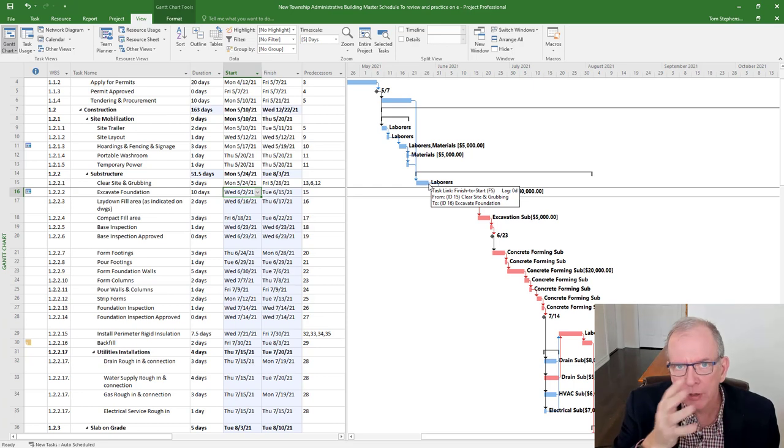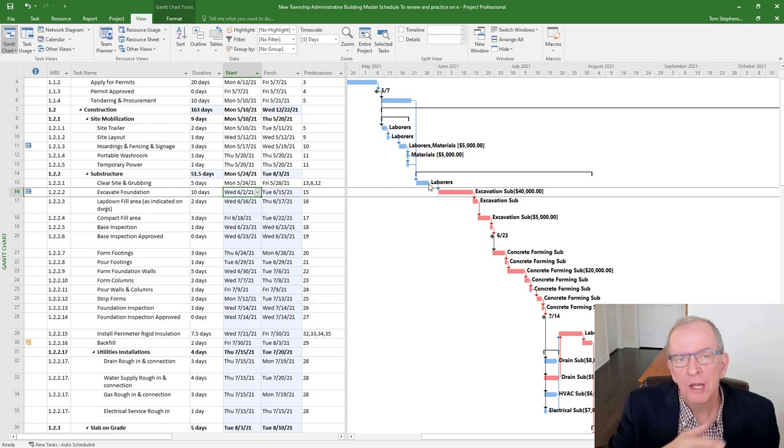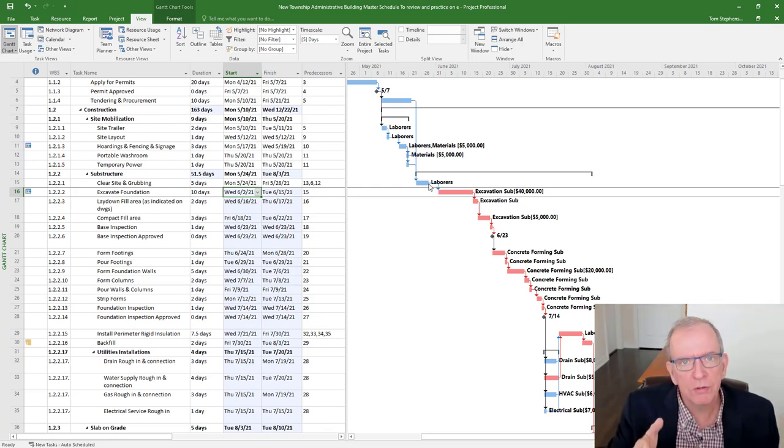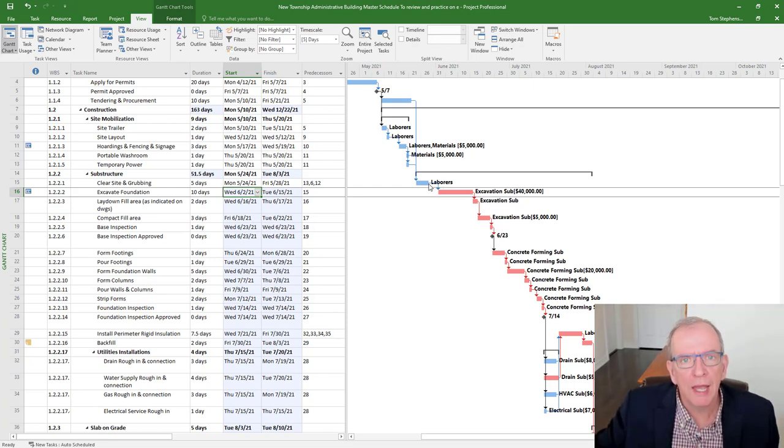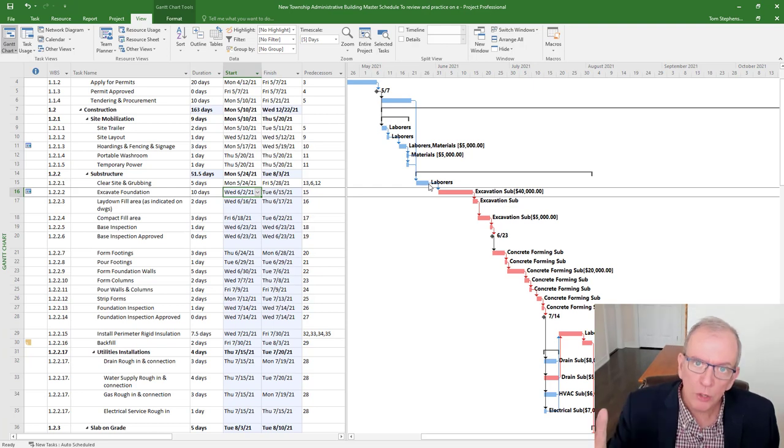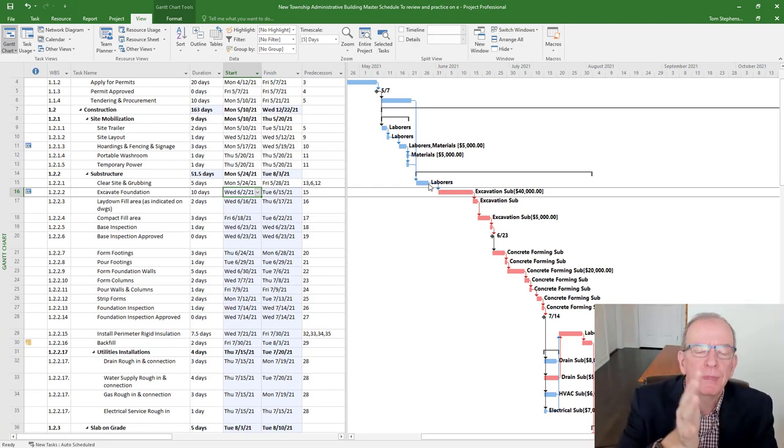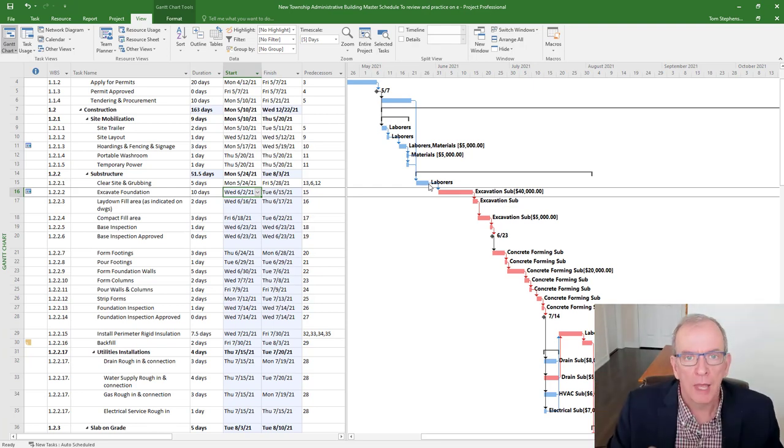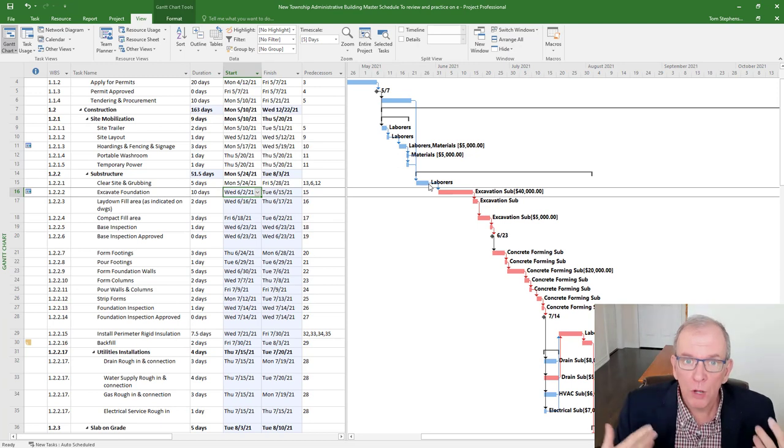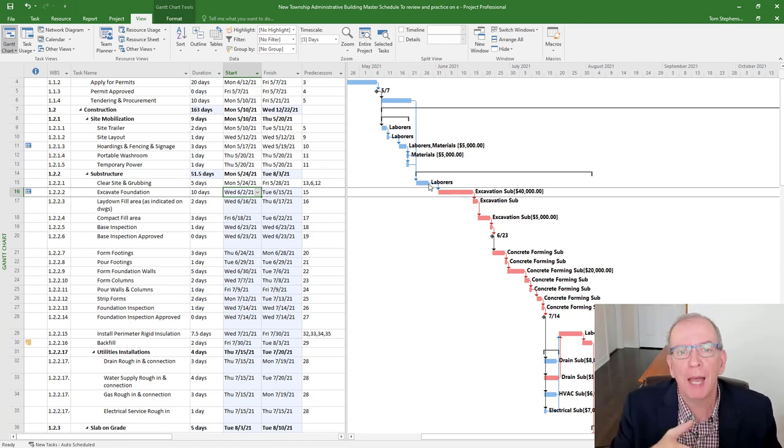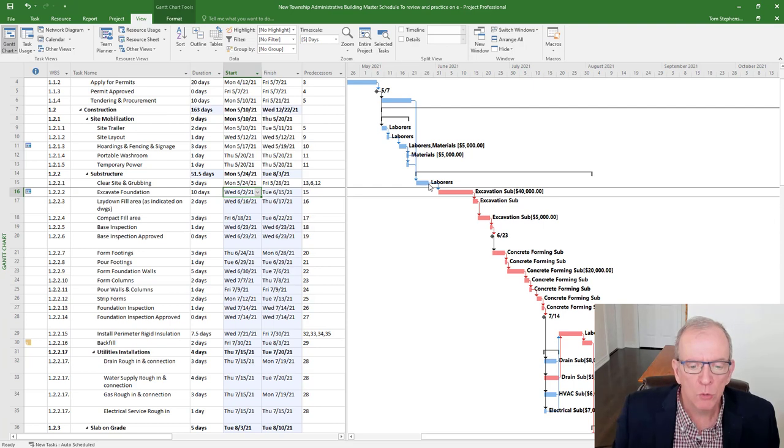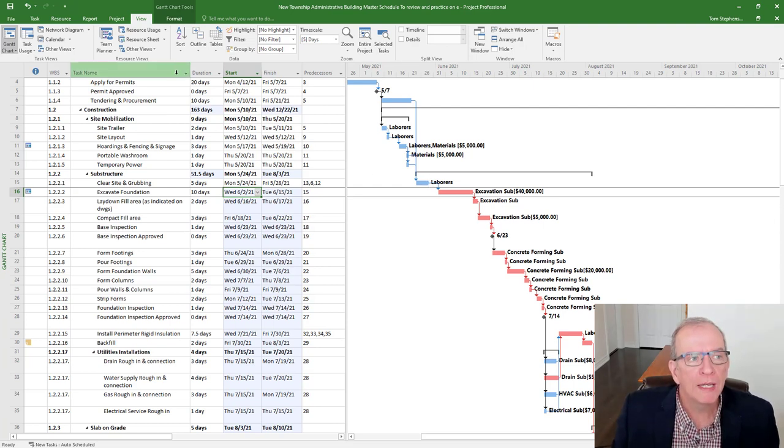The idea with the critical path is, when something takes longer, and it's on the critical path, it'll push everything out. Or if it's shorter, it'll shorten it up till something else becomes critical. And that's what you really want with scheduling software is to be able to tell what's the impact of this happening. So definitely avoid constraints wherever possible.